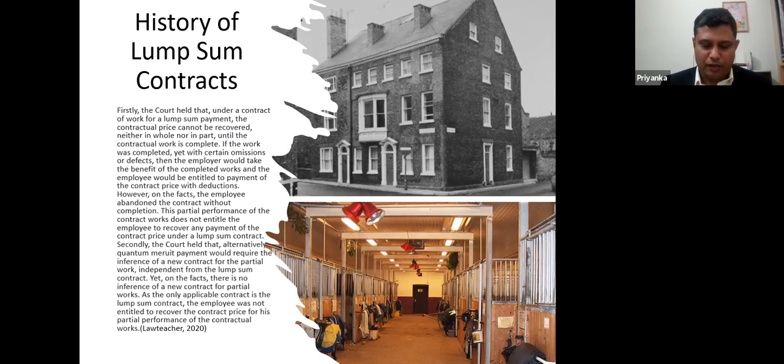It is an inherent feature of a lump sum contract wherein there is no payment mechanism in the early days, right? Now there are ways and means for doing evaluation, how the payments will be done. But in the early days, this triggered the significance of a performance bond, right? Had there been a performance bond at that time, that performance bond would have been encashed by the employer, because the contractor did not honor the contract, right?